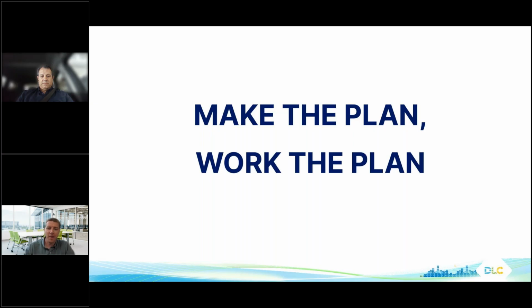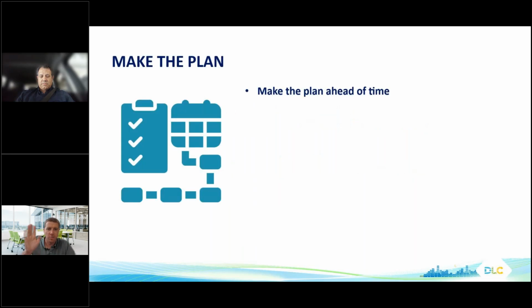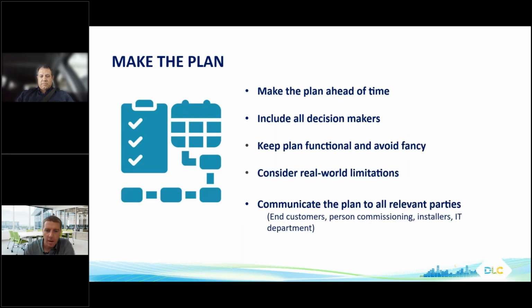All right, make the plan and work the plan. Okay, so what is making the plan? The number one thing is make the plan ahead of time. I see a lot of, okay, they installed a bunch of stuff and now they're going to make the NLC plan, and it's a little bit late and it's not going to go great. So make the plan ahead of time.